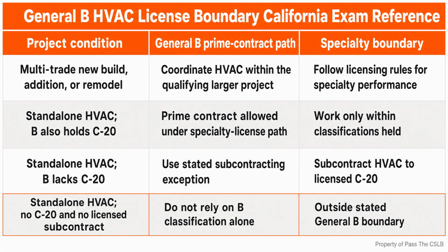That does not mean a General B contractor becomes the mechanical designer. It means the General B recognizes the boundary, hires or coordinates the properly licensed people, and checks that the required design and compliance work exists before procurement, installation, and inspection lock the project into a bad decision.